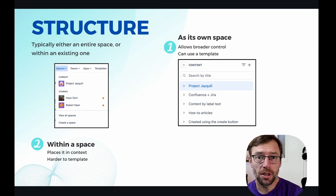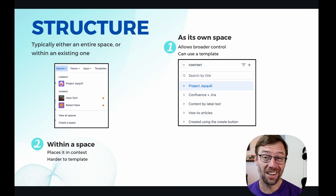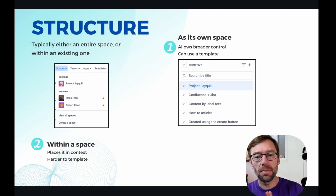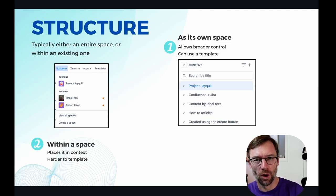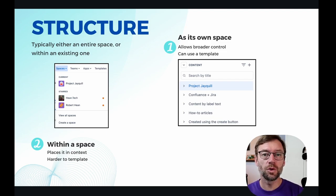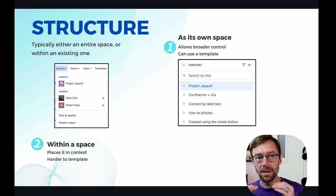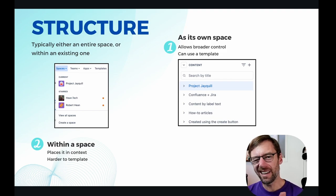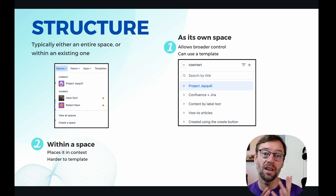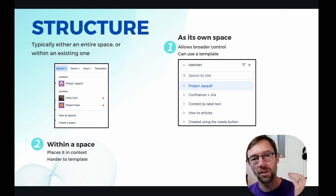One of the first things I need to consider as a project manager is how will I structure all of my information in Confluence? There are two main decisions: I can pick my own space in Confluence, which is similar to a room in a library where I can organize things separately, or I can put it within another space. I typically use my own space when the project is pretty big or if there are special considerations around access controls, since spaces give me more abilities to control who can see and do things.